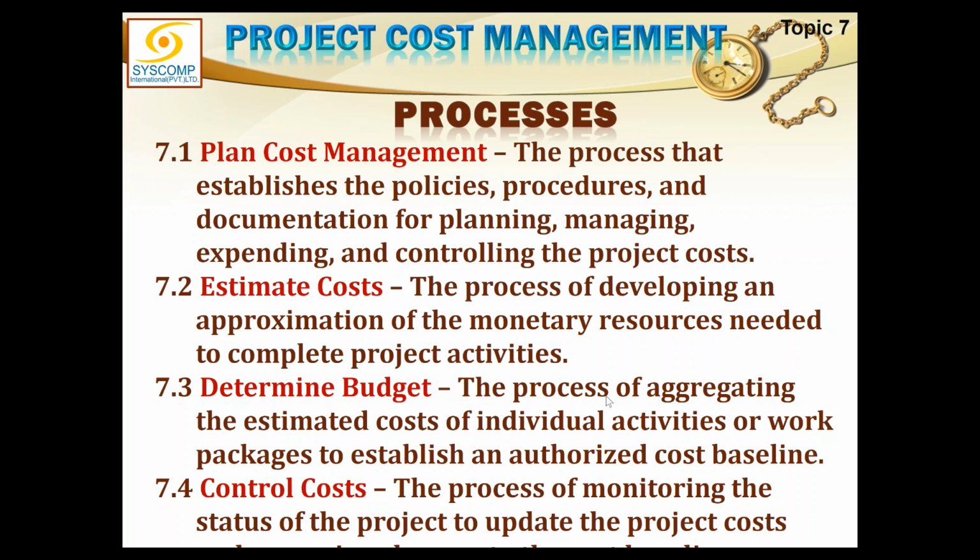Determine budget is yet another process which checks the estimate of the cost prepared by the project manager and his team. It adds them all up, aggregates them, and then inspects individual activities or work packages to establish an authorized cost baseline. And control cost, naturally, is the process of monitoring the status of the project to update the project cost.